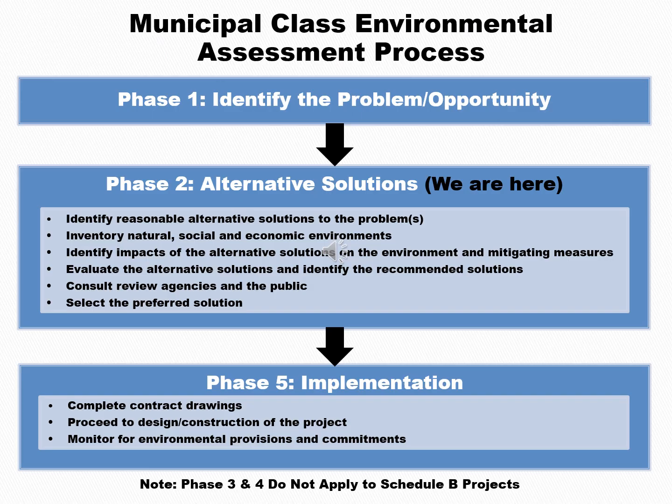The Municipal Class Environmental Assessment Process. Phase 1: Identify the Problem or Opportunity. Phase 2: Alternative Solutions. We are here. Steps in Phase 2 include: identify reasonable alternative solutions to the problem; inventory natural, social and economic environments; identify impacts of the alternative solutions on the environment and mitigating measures; evaluate the alternative solutions and identify the recommended solutions; consult review agencies and the public; select the preferred solution. Note that Phase 3 and Phase 4 do not apply to Schedule B projects, so on this project we will jump from Phase 2 directly into Phase 5, Implementation.